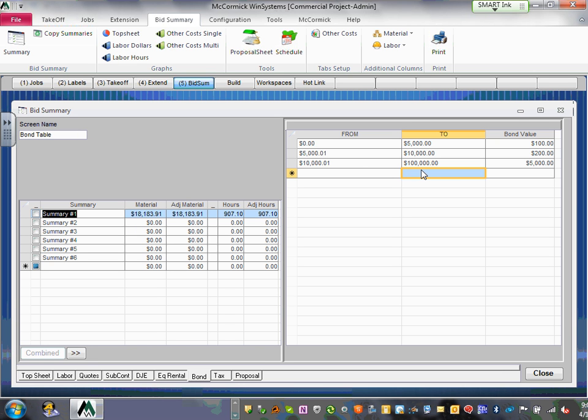So we got these up to 100,000. I think our project is going to be higher than that. So let's just say from there to 500,000, we're going to make it 1,000 this time. And from there all the way to 2 million, it's going to cost us 5,000. Okay, so that's your bond.